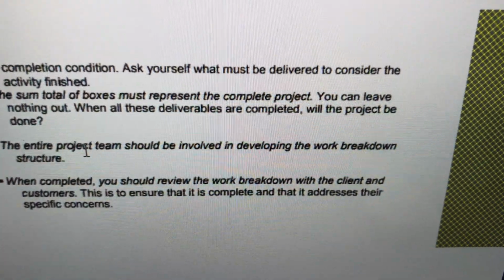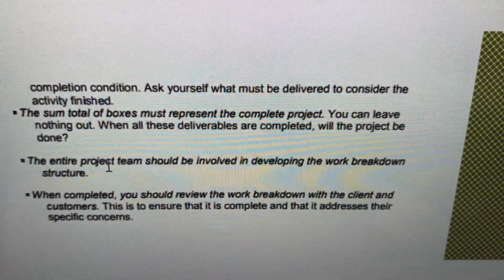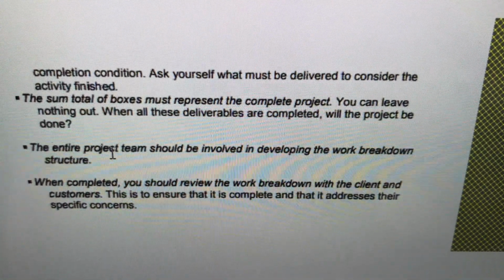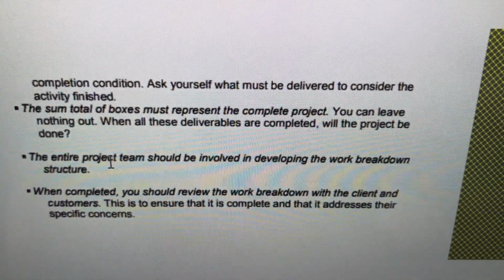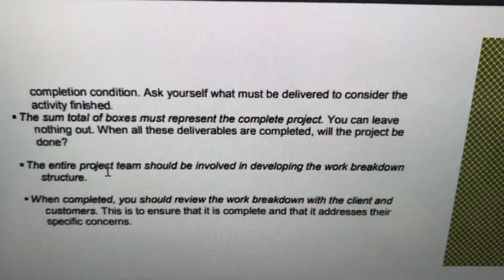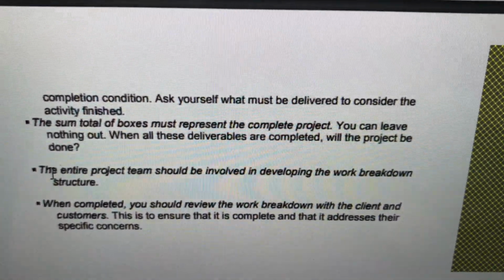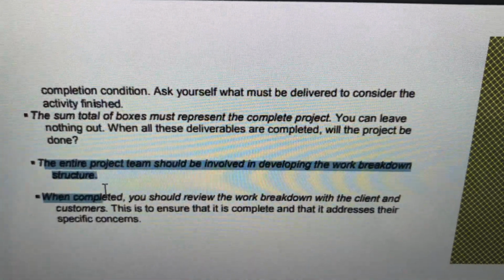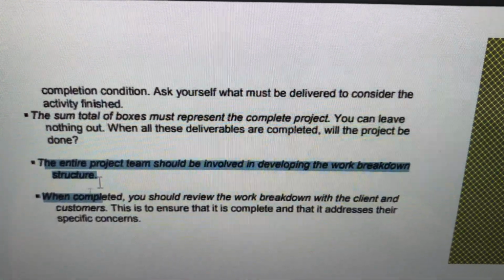Will you hire a tester who is required in month 8, in month 1 itself? You're going to pay 8 months' salary extra. It's not adding value to your business sponsor, correct? So when you say entire project, it means the entire project team at the start, at the planning stage.